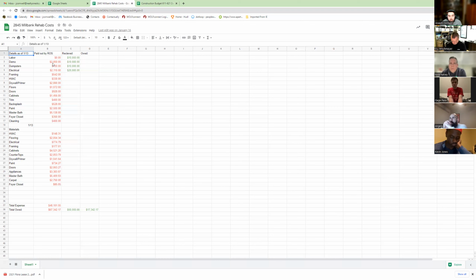And it's helped me gauge how we're tracking on projects as we go. So I literally update my labor hours and my material costs per project. I try to do it every week. Sometimes I get behind, it might be 2 or 3 weeks, but this here are my actual costs. So this is what I have paid out to my employees, my subs. These are what I paid out for material. And then this here is my margin on that project, right?